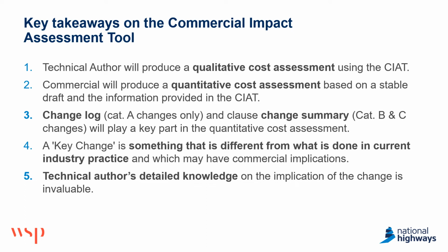The change log for category A changes and the clause change summary for category B and C will play a key part in the quantitative cost assessment, and therefore it's vital that these are complete and accurate. A key change, which is terminology used in the toolkit, is something that's different from what's done in current industry practice and which may have commercial implications. Technical authors' detailed knowledge on the implication of the change is invaluable, and it's this knowledge that is being captured in the Commercial Impact Assessment Toolkit.